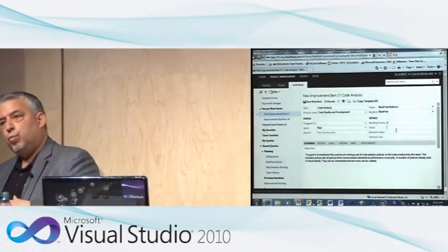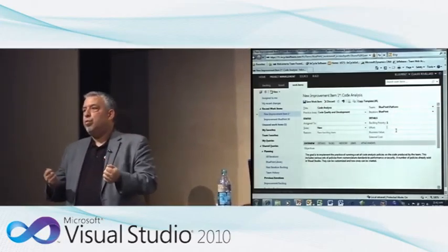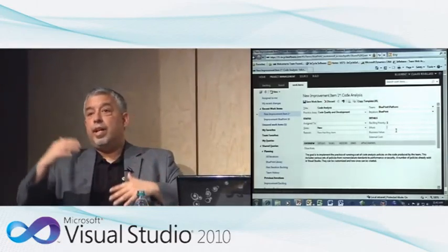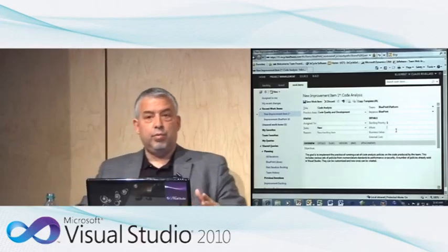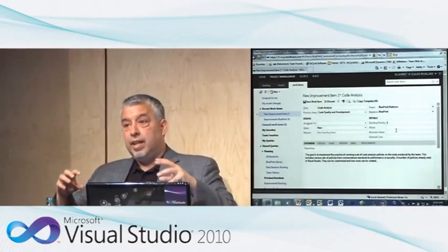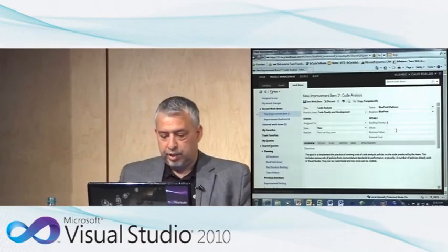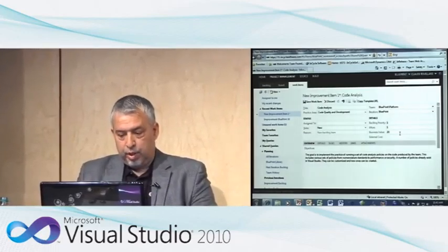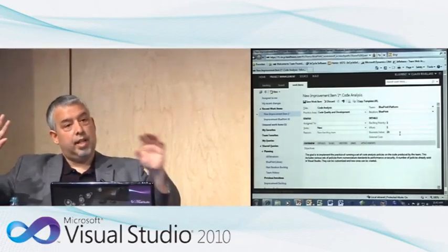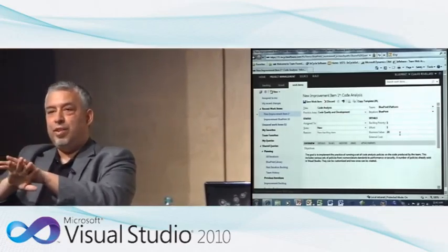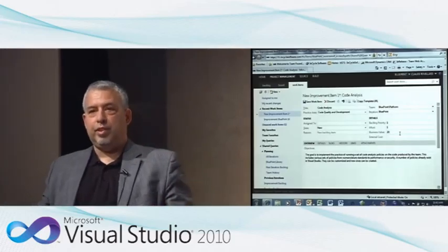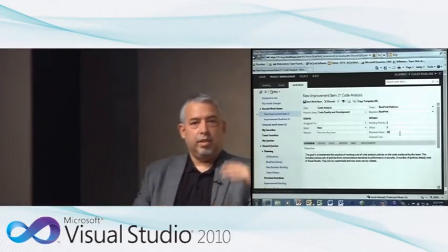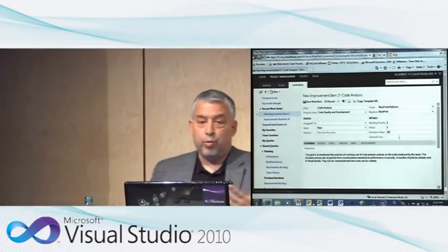The effort, we can use the same approach we use in Agile to measure effort. So we can do a poker, looking at the effort for the team. And it's relative effort. So again, we suggest using the Fibonacci 1, 2, 3, 5, 8, 13 to estimate the change effort that is involved from the change team. In this case, it's a fairly small one. I'll just put 1 point. The business value, let's say it's 20 points. I use Fibonacci times 10 because when I bring it into Excel and divide one by the other, it makes a bigger difference. It's easier to see 14 versus 21 or 10 versus 50 than 1.4 versus 2.1. So for me, it's just the way I do it.